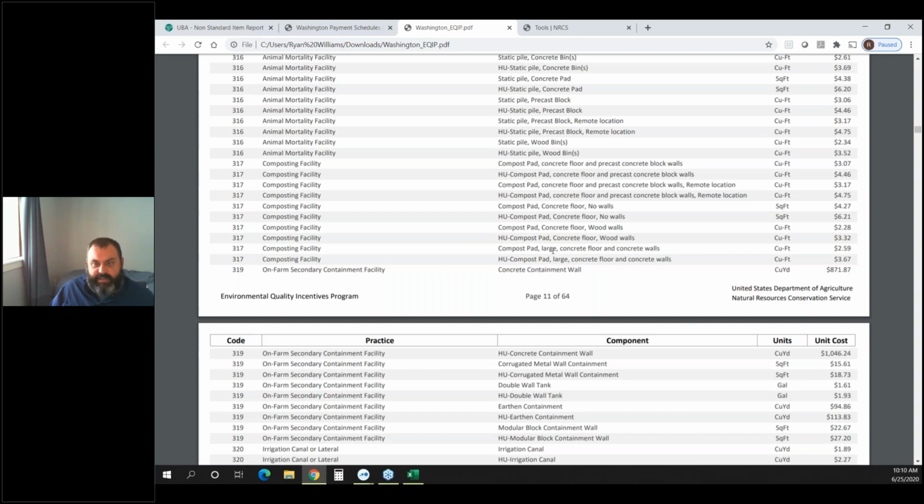Other than that, if I have something new, I'll start here, and then I might start doing online searching, at least initially, and calling around to local suppliers who may have different pricing. So just think of the elements you can, and then always add in a factor of contingency, because you don't know what you're going to hit if you start digging, or if you have issues with supplies, like they don't have the right posts locally. So hopefully this helps a little bit for you guys.